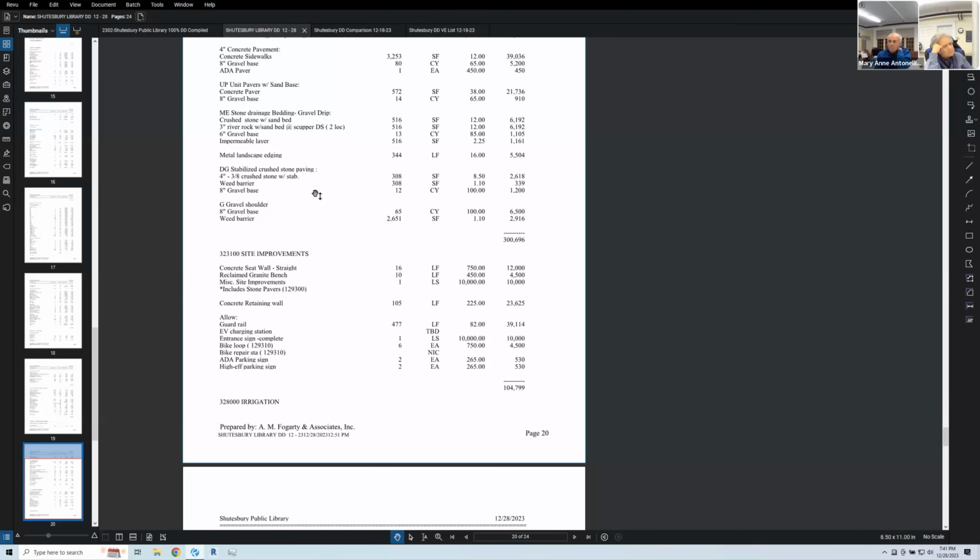Dominic, I would venture to guess that he's carrying $30,000 to get the domestic water from the wellhead to the building. That would be a site cost. It would not be a plumber's cost until it gets to within 10 feet of the foundation wall. Then the plumber takes it over and runs it into the building.